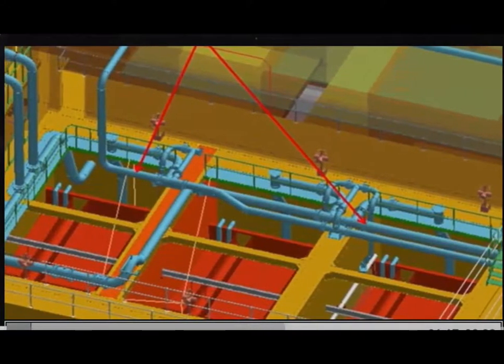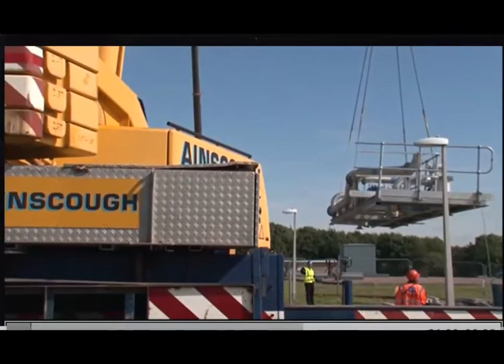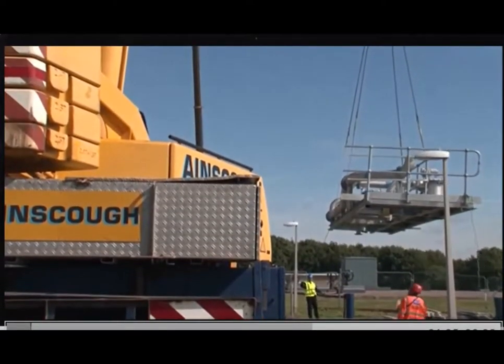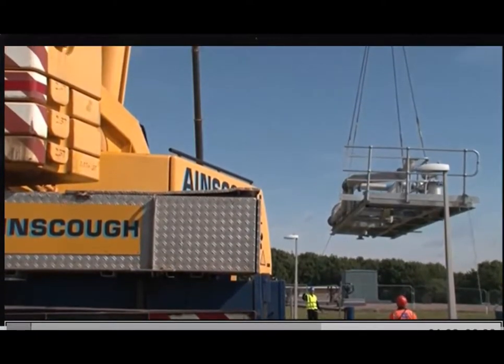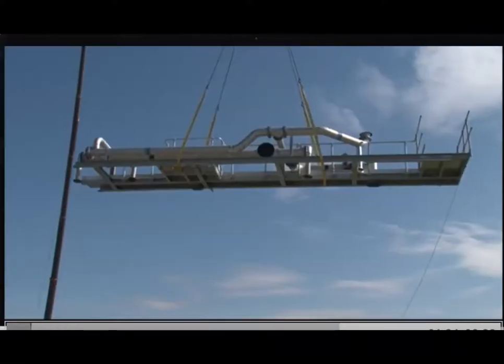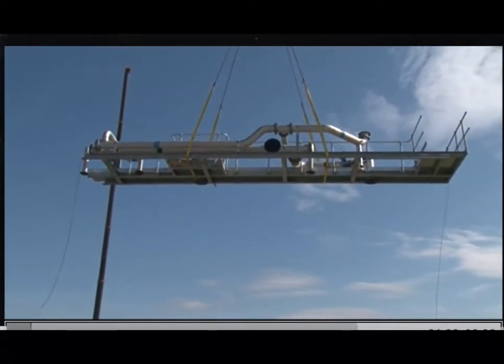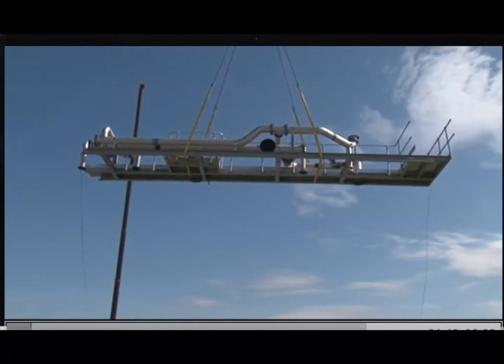The left shift means taking all of those key people from across the life cycle of the asset to the front and designing that in a virtual world using BIM as a platform for that, so that you basically build the project from the bottom up, every aspect of it virtually. You can check all of your interface clashes, you can start planning all your logistics, and you can work out all of the problems that might crop up. Obviously, you're going to have people that are working away from site, so you need to allow that. You need to build that in to your people's time. But what it really means on site is you're shortening the program all of the time.